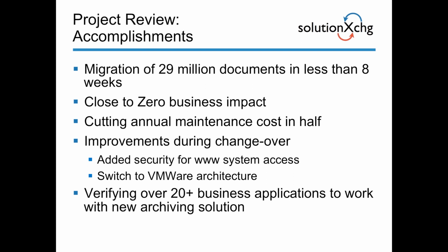What did we accomplish in this project? We migrated 29 million documents in less than 8 weeks real time with close to zero business impact. The annual maintenance cost was cut in half, and we added a number of improvements to the system during the changeover. We added security for World Wide Web system access to it by introducing firewalls and safety measures that weren't in place and were identified during the project.